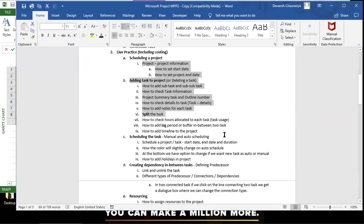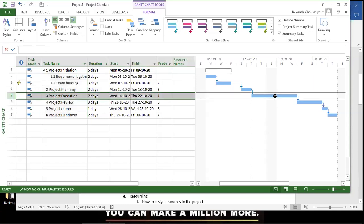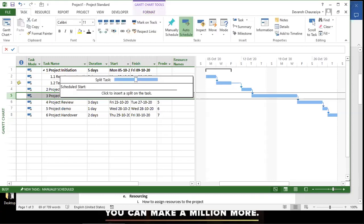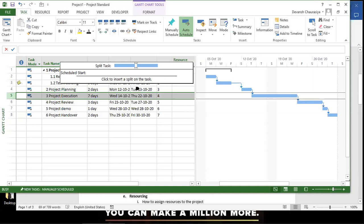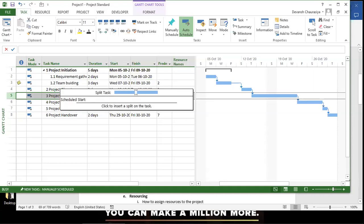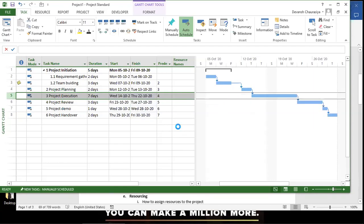You can also split a task if part of it must wait for something else. Click on the task and use the Split Task option. I'll undo that as it's just a demonstration.